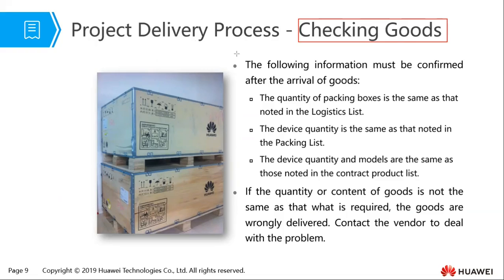So that is part of the project delivery process. So we must check delivered devices to ensure that they are okay, they are working, the quantity is as specified in the packing list and such like things.